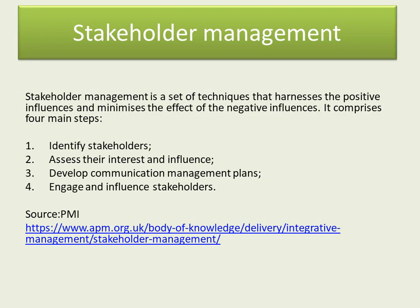The Project Management Institute gives us a nice four-step process for stakeholder management: identify them, assess their interest and influence, develop communication management plans, and engage with and influence them. There is some extra reading available if you'd like to look at that.